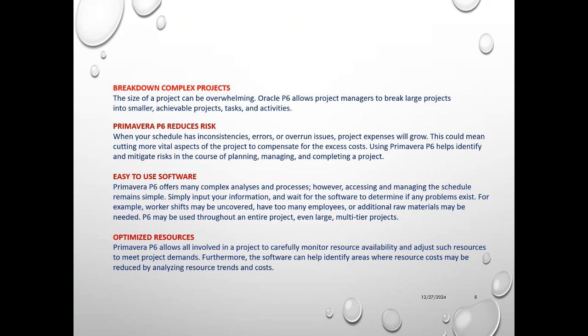P6 will help you break your complex project into very small fragments, to whatever level you want. We'll see what level 1, level 2, level 3 are. The program I break into different projects, projects into different work packages, and work packages into different activities. Whatever level you want to go to, you can go. Level 1, level 2, level 3, level 4. We are going to learn how to create all these schedules.